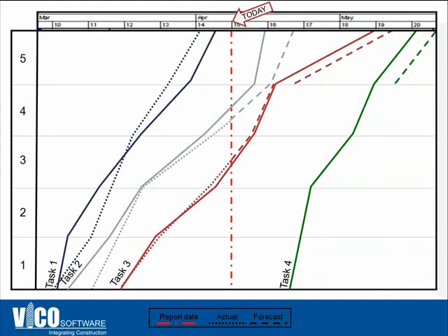You'll be able to see that there is a conflict here between the drywall guys and the painters, and they will have to demobilize and mobilize again, and basically it will cause a cascade of delays in the project. And you see this 2-3 weeks before it actually happens, as opposed to putting out fires the same day when they happen.